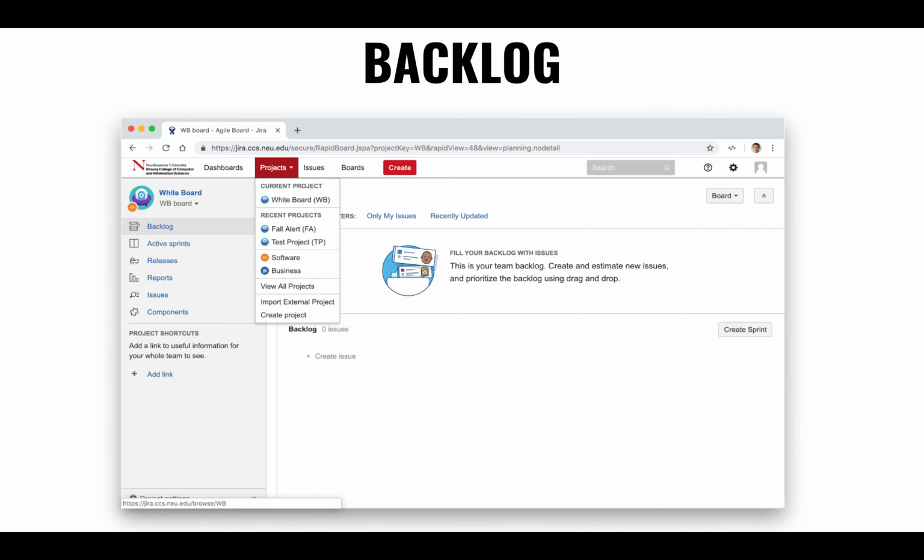A lot of the stories will be completely void of any detail, maybe just a title, perhaps. All right, most of them will be like that. But as the product owner and the project manager talk to the users and the stakeholders, they'll be adding new knowledge to this. And once they feel that they're ready to develop that particular sprint, they'll move them over into the sprint. They'll identify their developers and move them into a sprint and assign them to a particular developer.